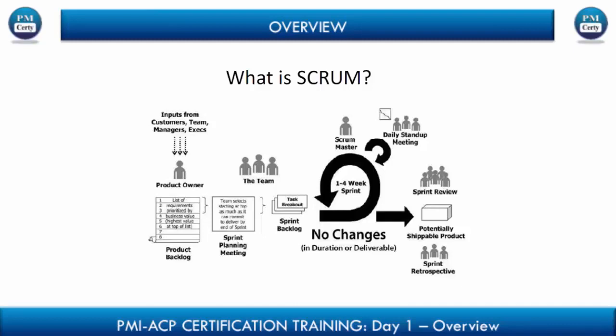Now we'll see one more interesting thing. Once this has been fixed, there can be no change in the requirements. That means, though we like and embrace change in the world of Agile, during the course of a sprint or an iteration, we will not take a change up. Nobody can come and tell the product owner, we decided something is important, please start working on it now. It cannot be accepted because that's all boxed and we have a deadline for it, so only those requirements will work. Any of those changes will be included into the backlog and will have to be reprioritized only after the end of the sprint or iteration.